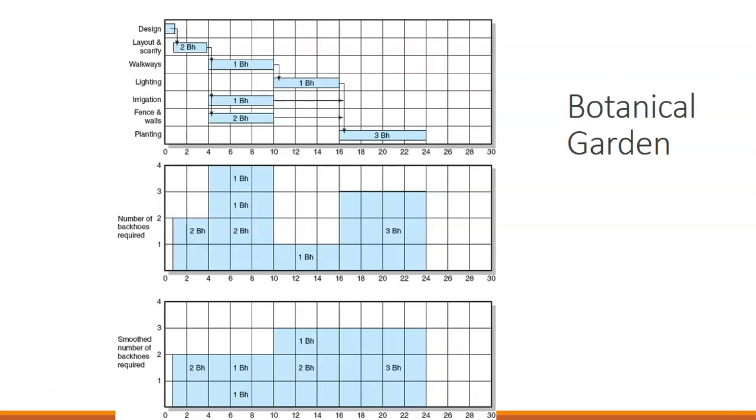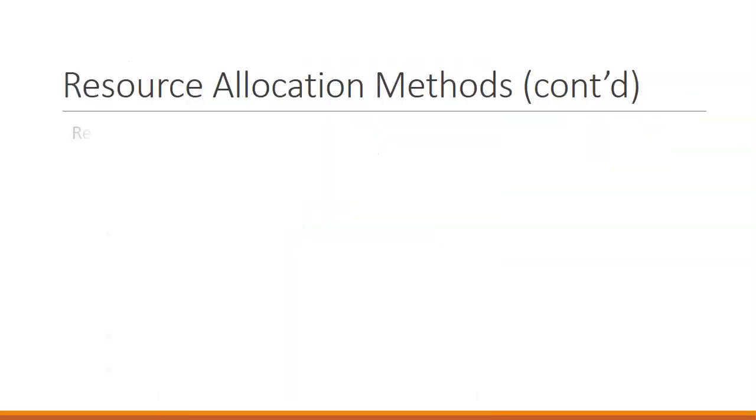We still complete the project in 24 weeks. We've just shifted part of the week 4 through 10 activities to their late times during the 12 to 18 weeks. It doesn't do any detriment to our project, and it helps reduce the number of resources that we need.